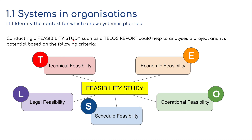Conducting a feasibility study — such as a TELOS report — could help analyze a project and its potential. TELOS covers: Technical feasibility, Economic feasibility, Legal feasibility, Operational feasibility, and Schedule feasibility.